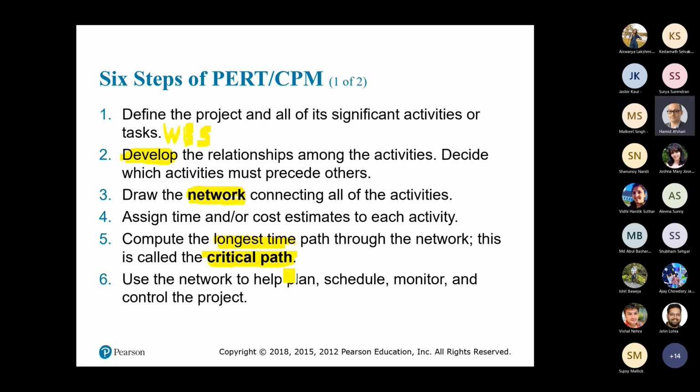So I'm going to repeat. It looks like I have to repeat everything. Let's say you are three friends, all of you are going to a party. You are going by one car or you want to take a taxi, whatever, doesn't matter. Then one of you takes half an hour, another person takes 45 minutes, and another person takes 1 hour. Let's say it's 6 p.m. So when should you call the cab to be in front of your home? 7 p.m., I guess. 7 p.m. Okay, so that's the idea behind the critical path.